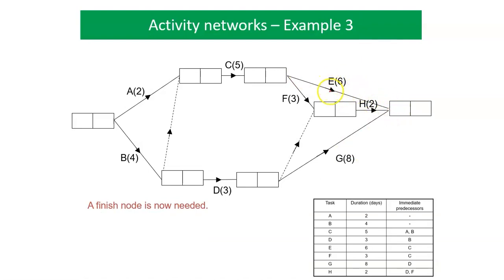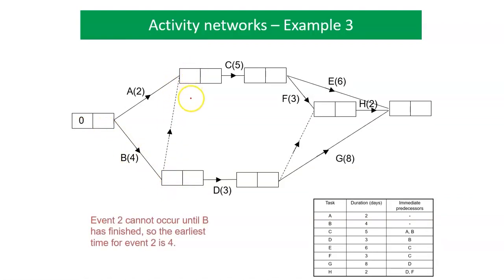Now we do our first pass, the forward pass, looking at the early start times. And you should recall that we put the 0 in there. There it is, and then all the others we can just see if we can work our way through. Now I'm tempted to put a 2 here, but there are 2 arcs coming in there, so actually we're better off doing this one here. This one's going to be a 4, only one thing goes in there, and this one's going to be a 4 as well. So that 4 is easy. This one's a 2 and a 4, and you should recall we always put the biggest of the numbers going in. The biggest one is what you write down, so that's going to be a 4 there.